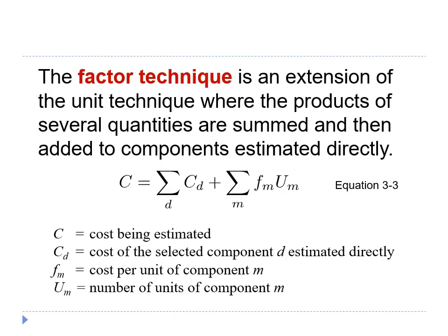The third and the last estimating technique we look at is the factor technique. The factor technique is an extension of the unit technique, where the product of several quantities are summed and then added to components estimated directly.